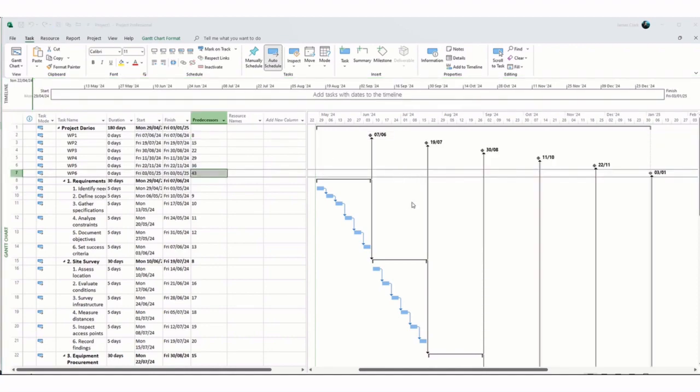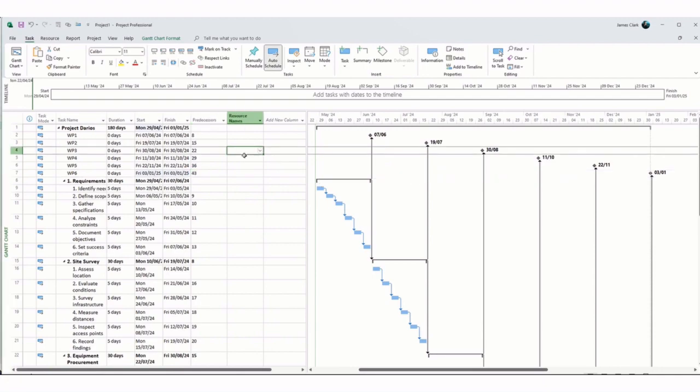As you can see, I've got my 6 milestones set up for completion at the end of each work package. You can see them across 1 to 6 there. Now, one thing it's good practice to do is to measure success directly on the Gantt chart. We should set these milestones up with deadlines. I'll show you what happens when we do that.